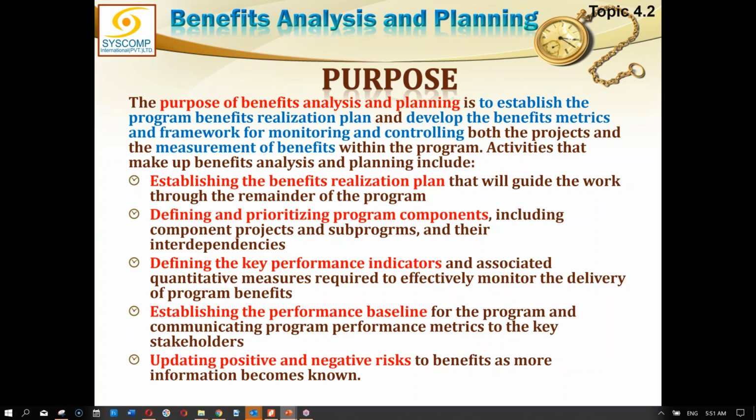These are the guidelines and instructions you must take into account while creating a detailed plan. So management plan is the governance structure, or the instructions or guidelines for creating that plan. For example, I am creating a benefit management plan. I will ask, what should I keep in mind while creating it? How will I identify the benefits? What should I keep in mind while identifying the risks? How should I be analyzing the risks? These are the ingredients of the management plan.